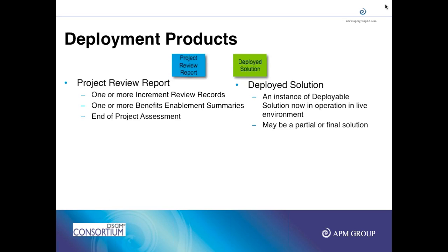Once the deployment is completed, there are a few things that you can do. If there is no more development remaining, you move to post project. If the next release is already planned and you have the requirements in the prioritized requirements list, you move to exploration to start collecting further details and doing analysis, design, and development of the next release.